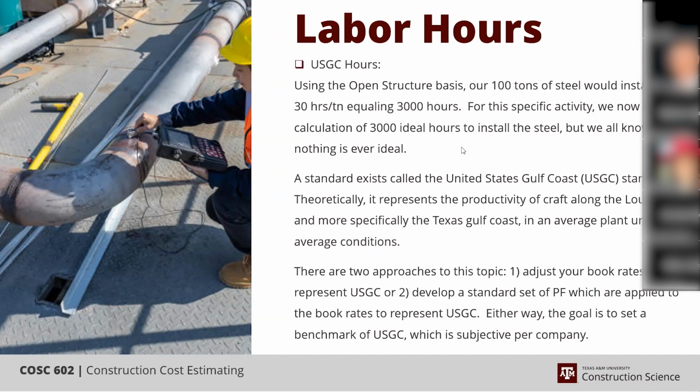So it's what it would take to install something in springtime under non-rain conditions, average decent weather, average congestion, average height impact, average plant conditions. And that's what the U.S. Gulf Coast is supposed to represent.